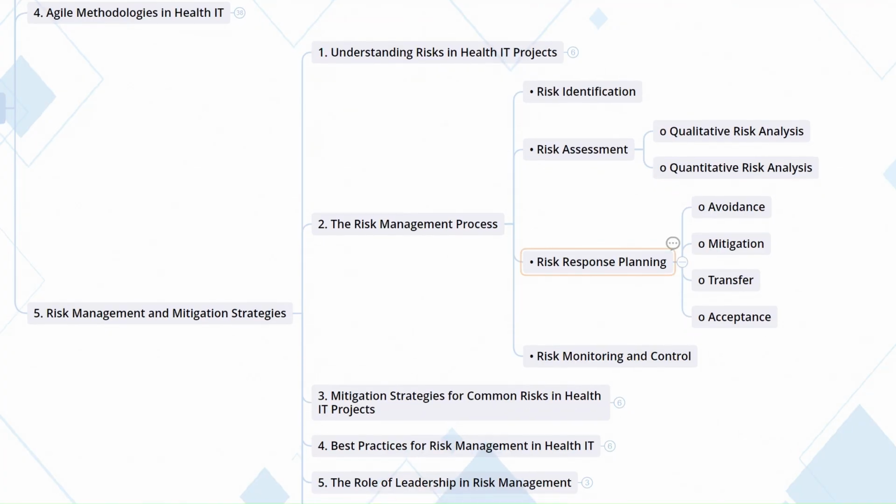Next, risk response planning. For each identified risk, develop response strategies to mitigate their potential impact. Common responses include avoidance, mitigation, transfer, and acceptance. Firstly, avoidance.